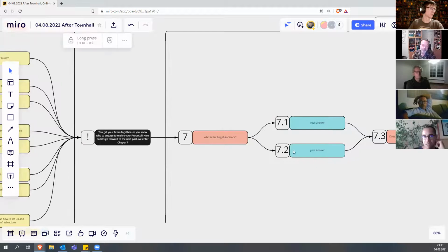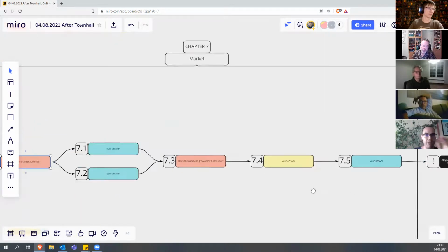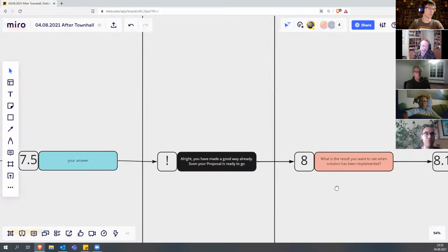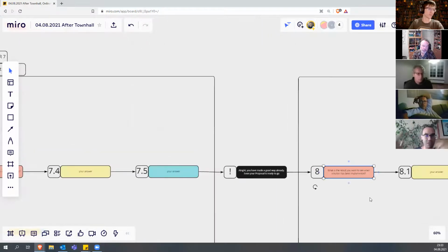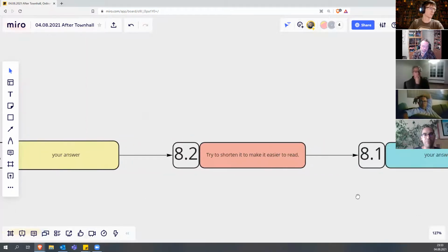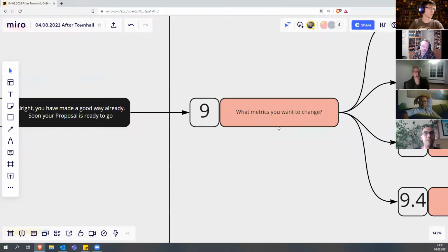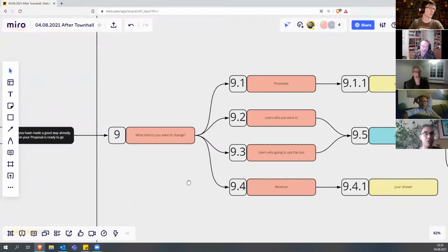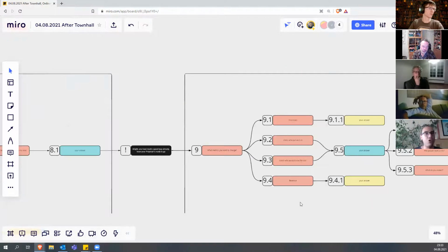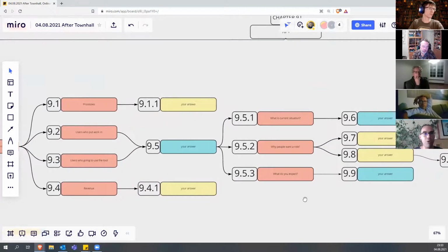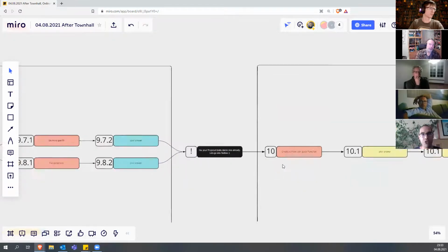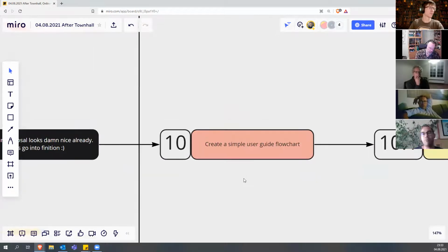Even without going into the details of the work breakdown structure and the tasks to actually create whatever it is that we want to create here, some interface to Twitter, some kind of logging step, some way of forking these proposals, whatever. I don't think the product is well defined enough if we can't define how the users are going to interact with it. You're not going to be able to explain to a UX person what they're building unless they know how the user is going to use it. You're not going to be able to define to the developers what pipelines and backends unless they know what kind of data they're getting. So to use the agile terminology, there should be a user story at the solution stage.